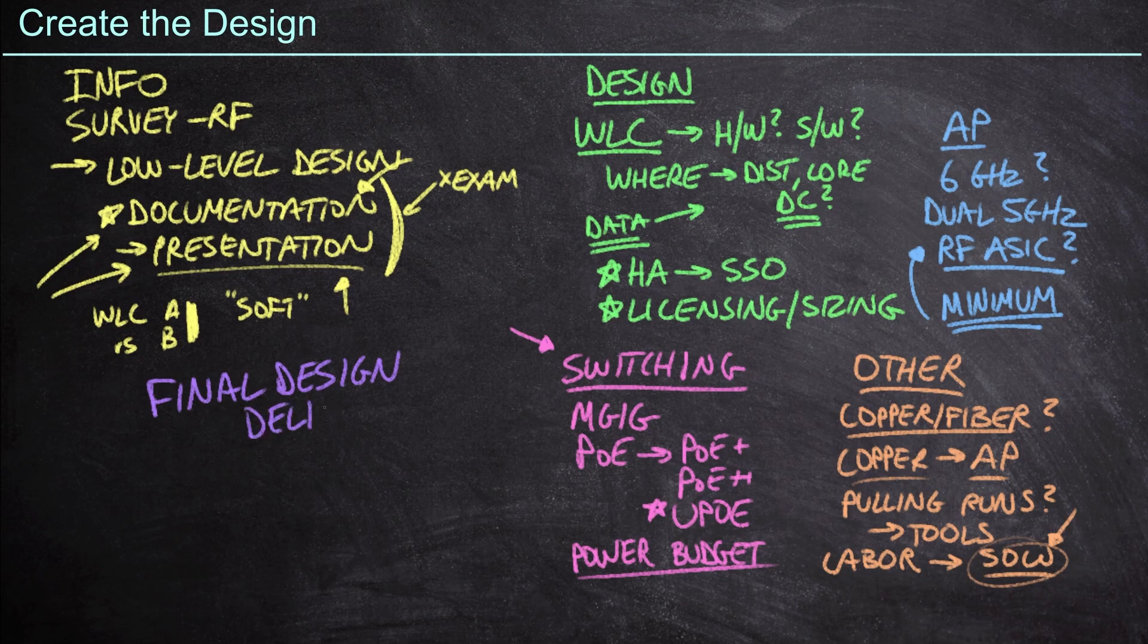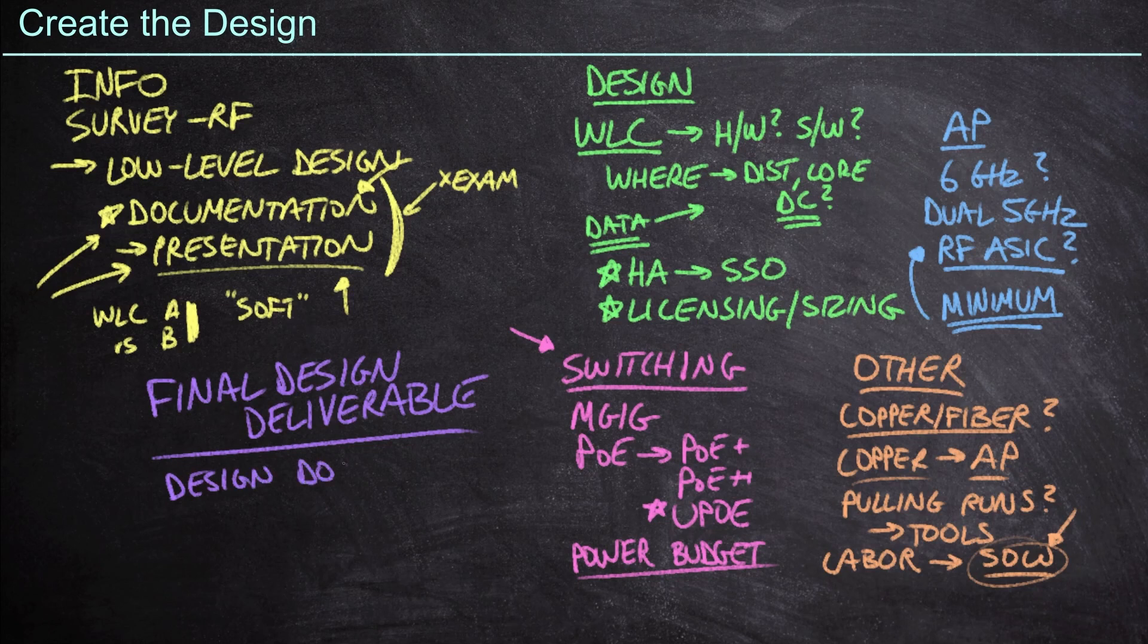And so ultimately, what we're going to do is we're going to create the final design deliverable. And so for example, we're going to have the overall design document that talks about the what we're doing and why we're doing it. We're also going to have the associated bills of materials or possibly quotes, depending on the situation. Either way is fine. We need to understand what the price is, as well as what we're getting. That's what the bill of materials would list, although the quote should list that as well.